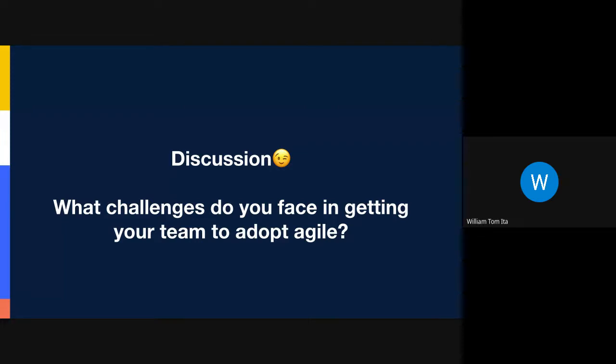And then what we now realized is that we were actually overclogging our sprints. We're trying to do too much within a sprint. So once we arrived at that average, we said, okay, for each sprint, we'll keep it to an average of this story point or this number of user stories that should be worked on within the sprint. So I think it's very important to also do that tracking, because if you can't even track what's being done or what's the average you can actually achieve, it just makes everything messy in the long run. Yeah, thanks. Thank you. Thanks, William.